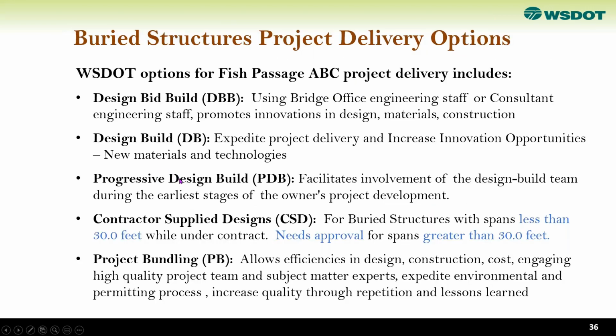So the last few slides are about the project delivery that we have. Again, there are lots of projects. WSDOT in general is using different options for project delivery, for this fish passage project and buried structures. Design-bid-build is our conventional practice, with in-house design or design by consultant. And design-build expedites project delivery and increases innovation opportunities, such as new material technologies.